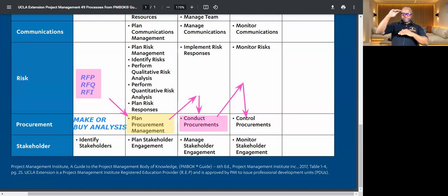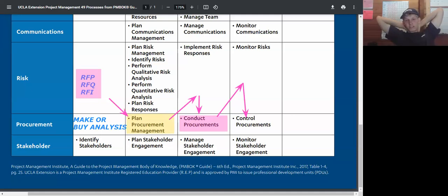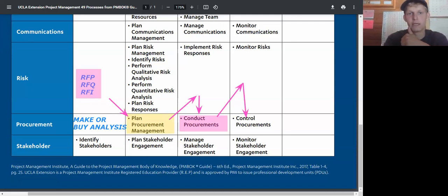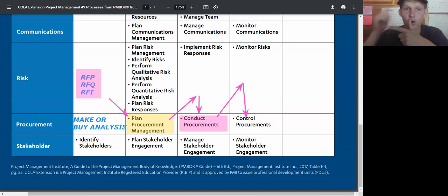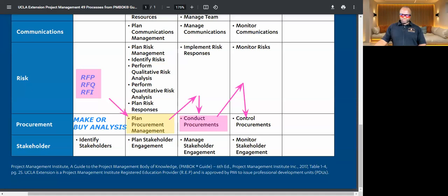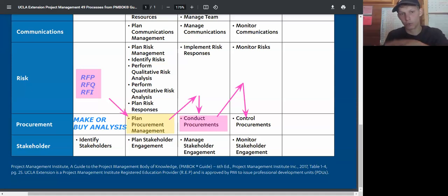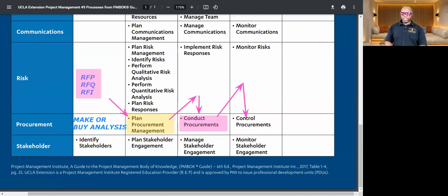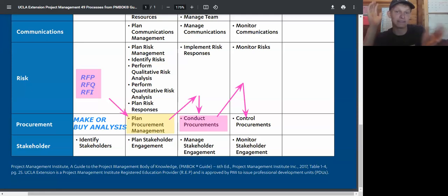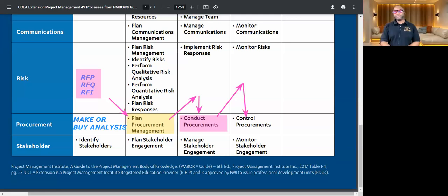You've got their world. And honestly, I feel like most of my job, for example, is making sure that trades stay in their scope and they work within their scope, that all of our deliveries are within their scope. Like, do we have the right hinges on the door for our color scheme? Did we get the right lights delivered? So I think control procurements and control scope, I felt like they're close or related, at least sometimes, right? Depending, that's very, very correct. And being that it's for a client, yes.